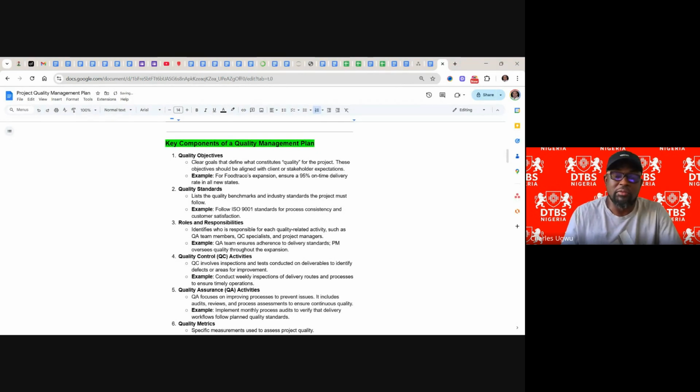You can't say, well, I don't know, my company doesn't do it. It's not an excuse. That's why you're a professional. As a professional, if they don't have one in-house, you follow a global standard. So the global standard is ISO, International Organization for Standardization, 9001. If you search it on the internet, you can follow it. It's very common. Even if you don't have it, there is a national standard, so you must find a way to have a quality standard to follow.